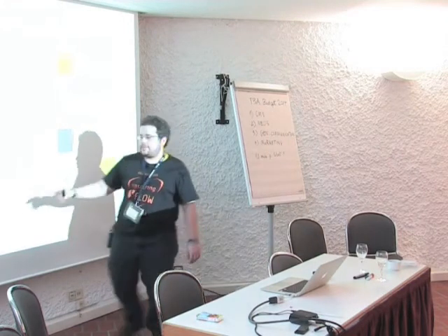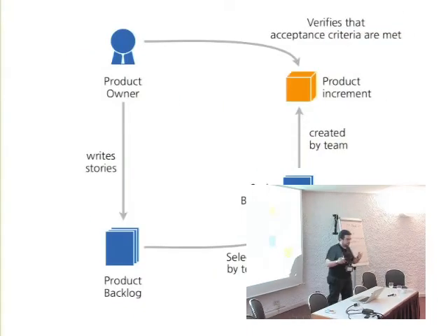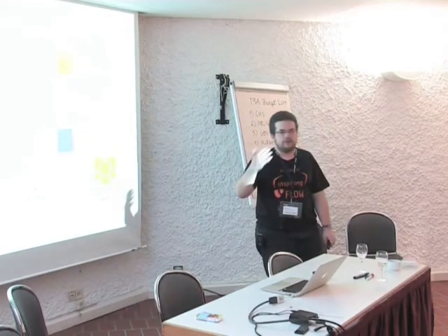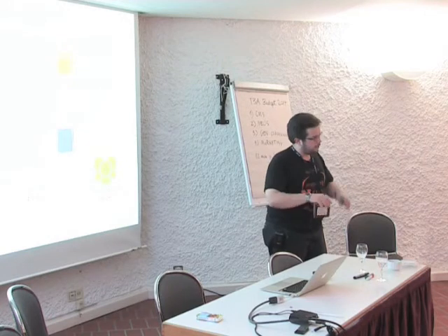And because we have these acceptance criteria that are attached to the user stories, I've shown the criteria for the user registration. At the end of the sprint, we can check using these acceptance criteria if all the requirements are actually met. So in the most simple case, we would have all acceptance criteria on a piece of paper, and we would take a pen and say, yes, there's a menu item called register, check. There's a form with the following fields, check, check, check. And we receive an email, check. So usually this is done manually. So the acceptance criteria are tested manually. So someone has to sit in front of a computer, open a browser, click, click, click, click.